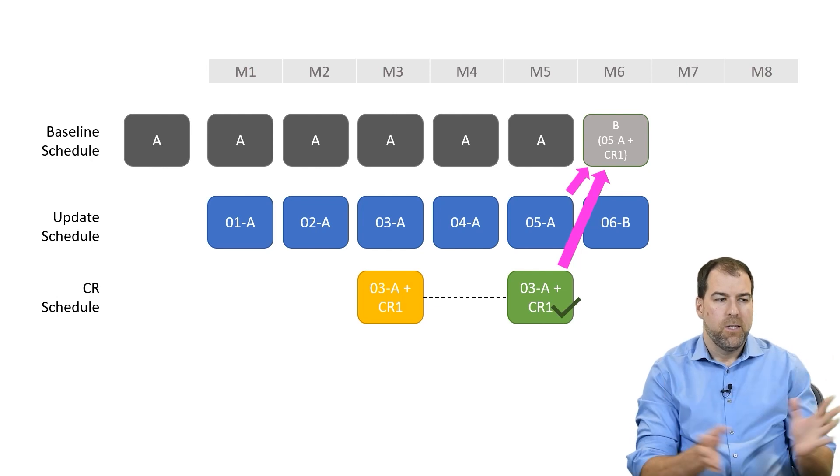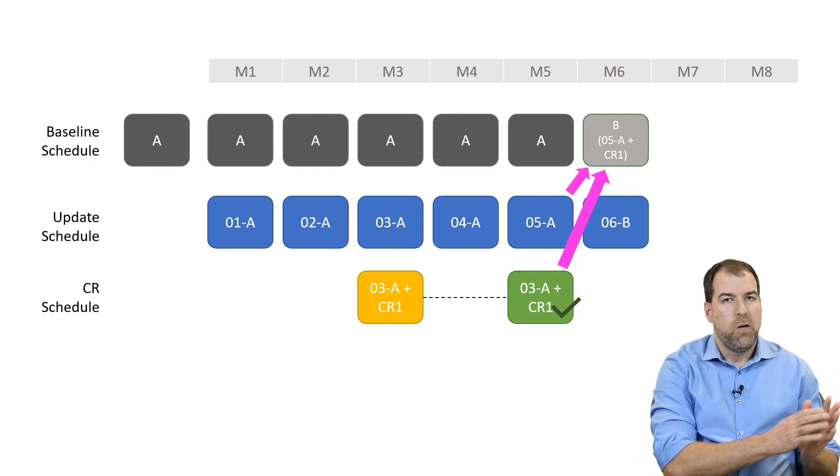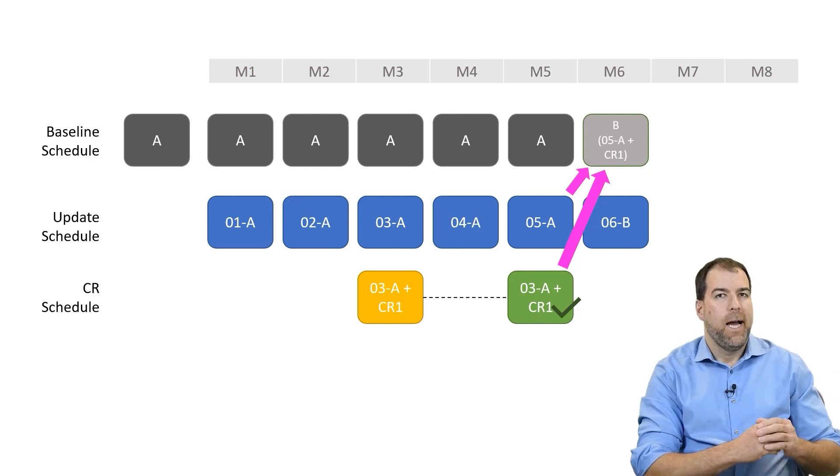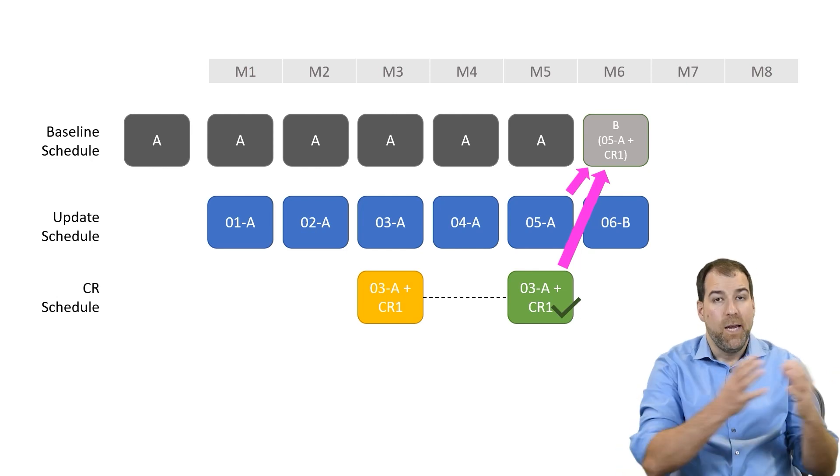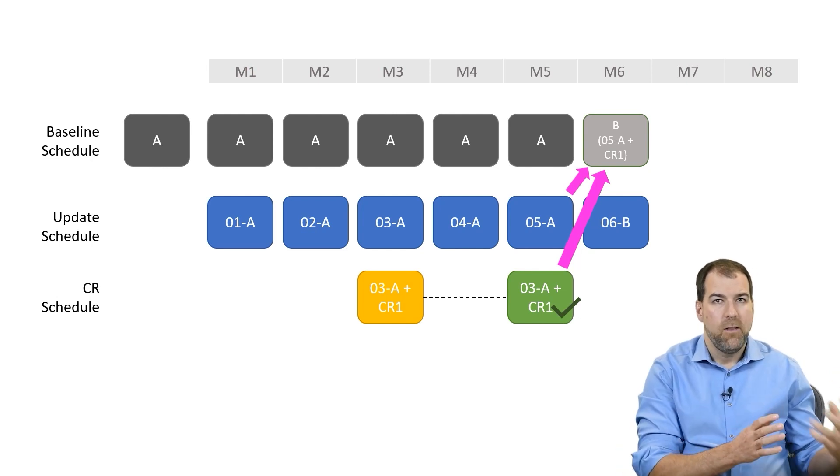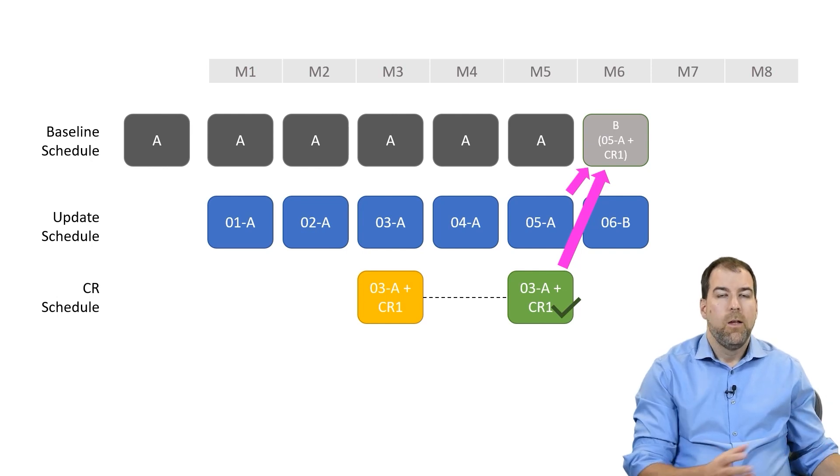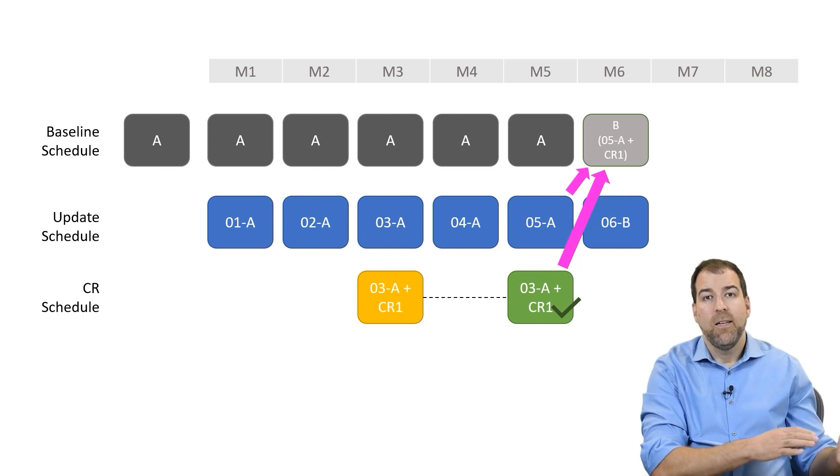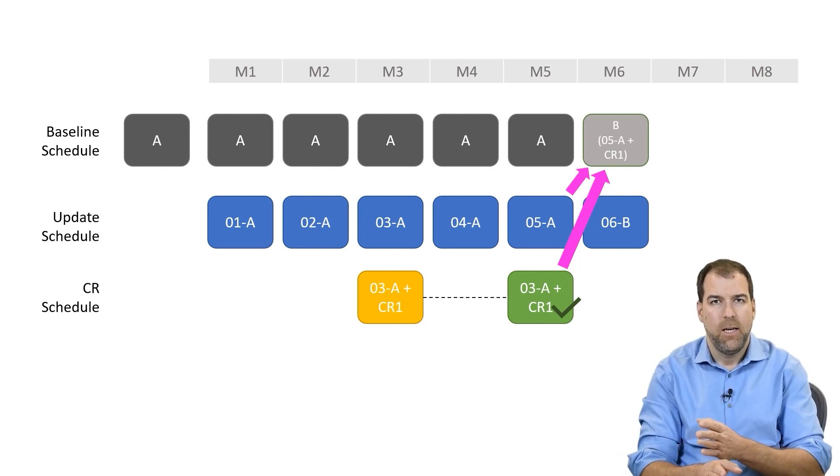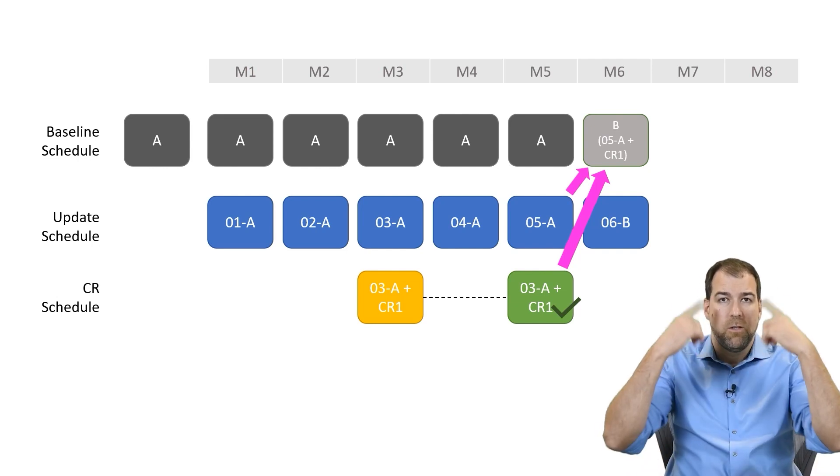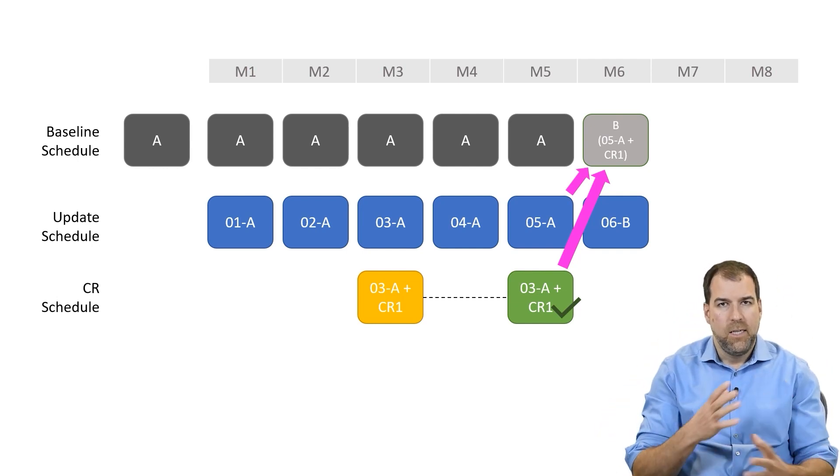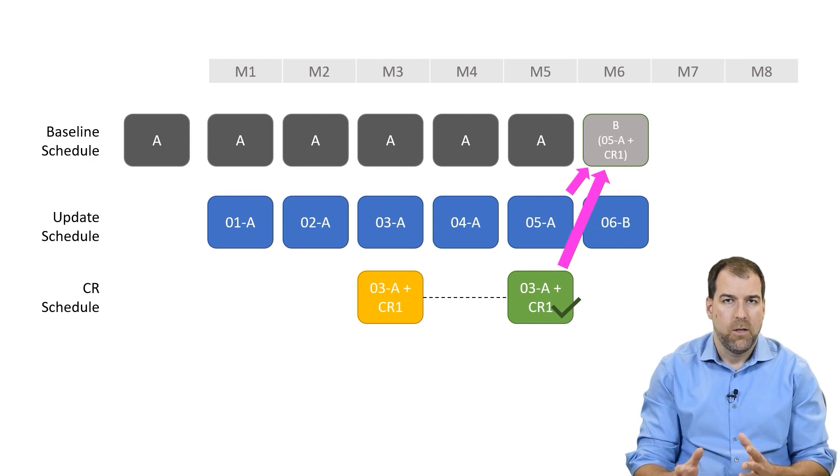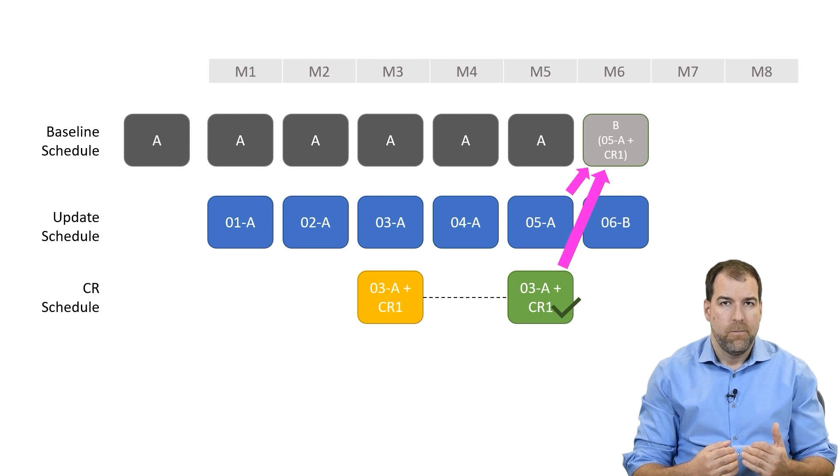The thing I want to point out to you here is the complexity of all this. We have multiple update schedules. We are now adding a new baseline, which is an amalgamation of some of those update schedules and this other superfluous change report schedule that we have to merge all this together and make it still work, make it still hit our end dates and make sense for all the costs to still link up to the total cost. So there's a lot of detail and a lot of process that goes into change requests from the scheduler's perspective.